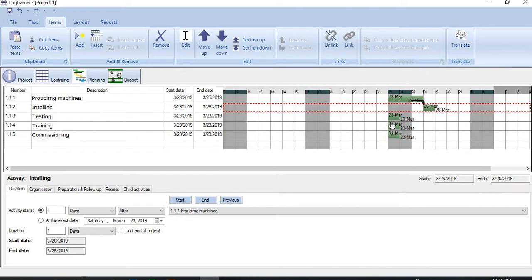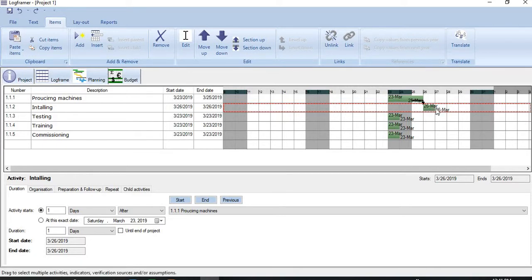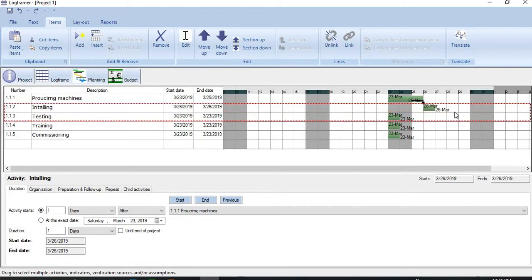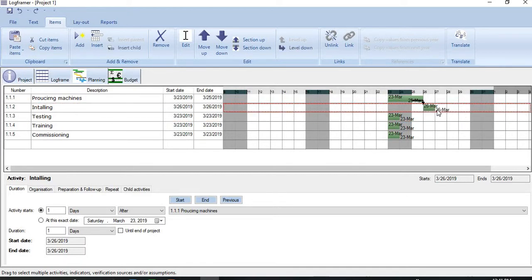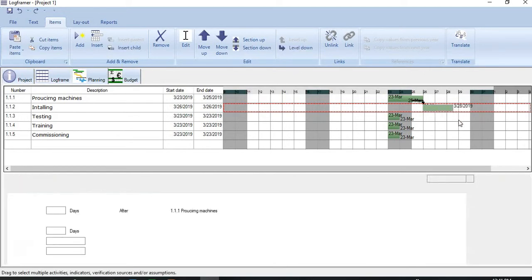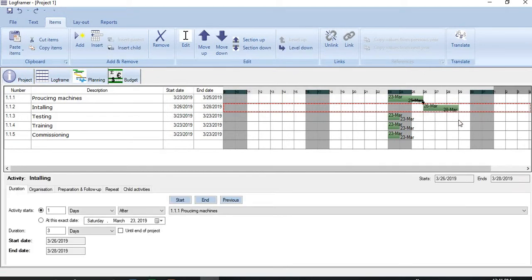Secondly, we can change the duration in another way also. For example, I want to change the duration of the second activity. Move the cursor to this one here. And the moment a double arrow appears here, push the left button and drag it. This is a way you can establish linkages among activities and also increase or decrease the duration of the activity.